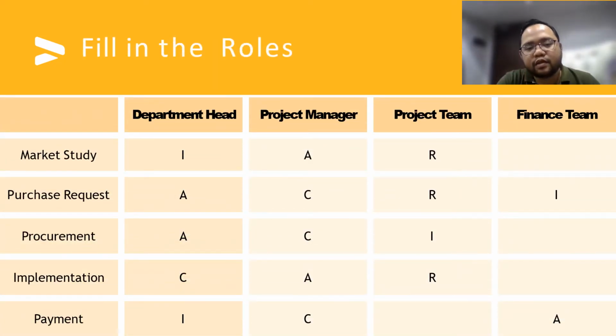Once we have completed the steps and identified the stakeholders, we now move on to fill the actual roles of every individual involved for every step. Here, let's take the case of the market study. The market study will be prepared by the project team and approved by the project manager.